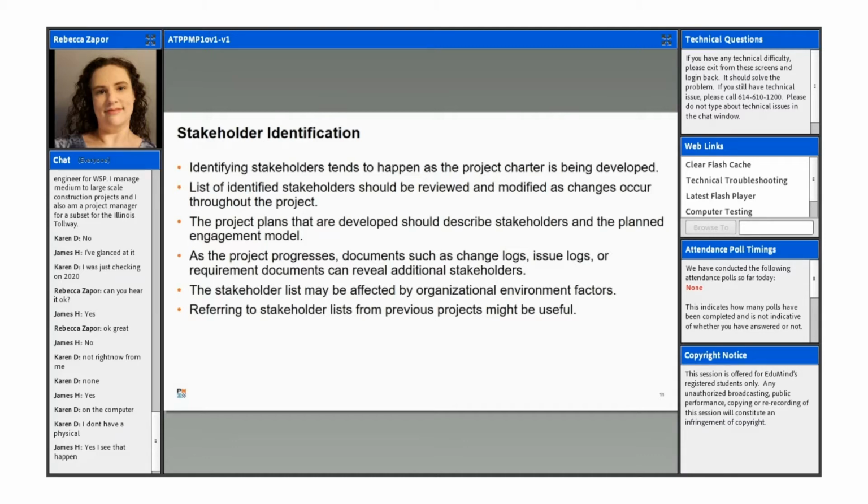Also, stakeholders should be regularly reviewed and identified, if there are new ones throughout the project as changes occur. Are all of the stakeholders that you identified at the beginning still there? Are there new ones? You need to constantly be managing and analyzing that, and also updating any stakeholder registry to make sure it's all accounted for. You want to document information regarding their interests, involvement, interdependencies, influence, and also potential impact on the project success.